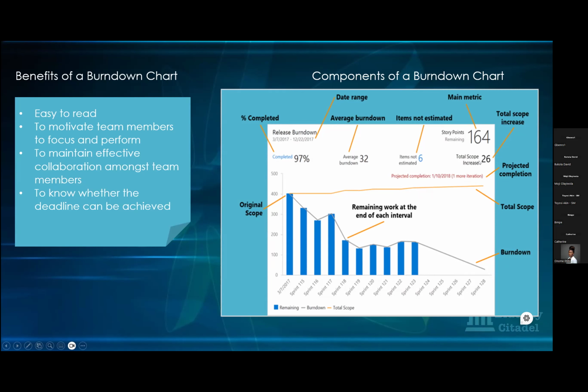And another way you can know is on this chart, where there were increases. If you look at this place, this is what they started with, roughly say 400. Then it dropped to something like 320, dropped further to, I can say 270, but then it went up again to 300. So that shows you this is where one of the increases is.